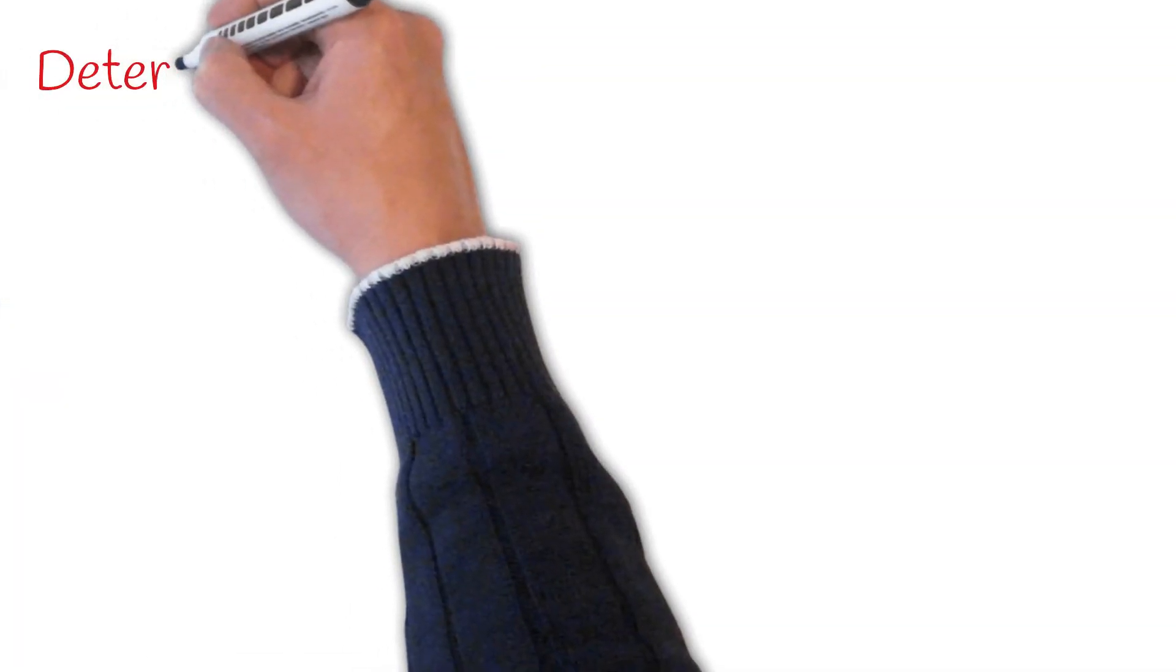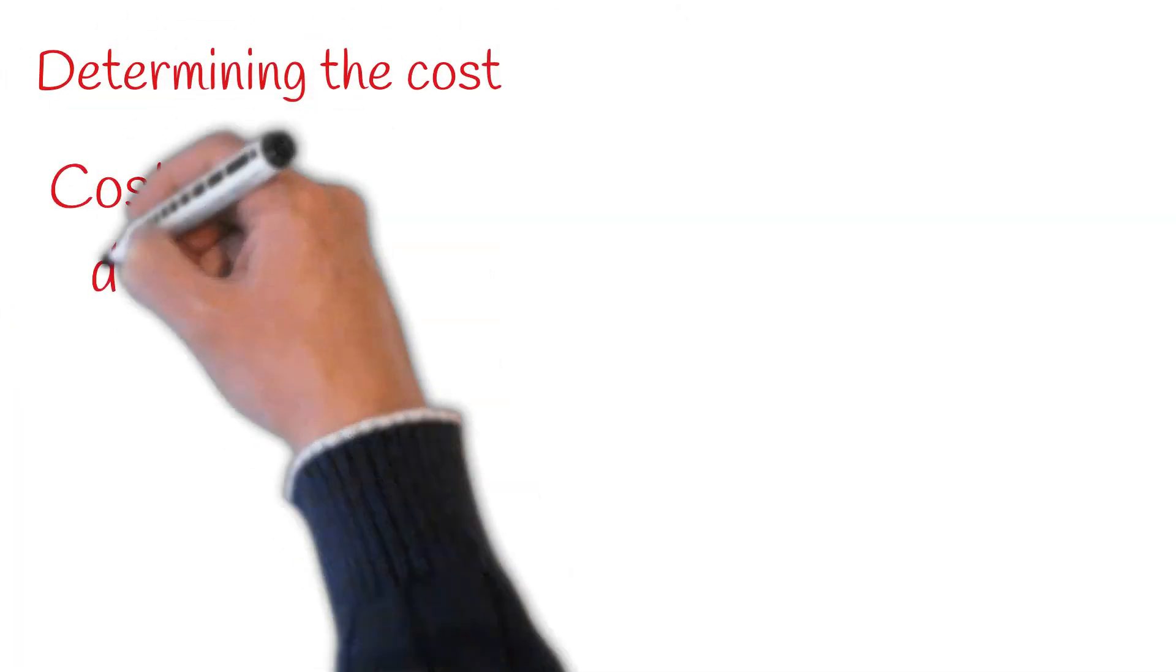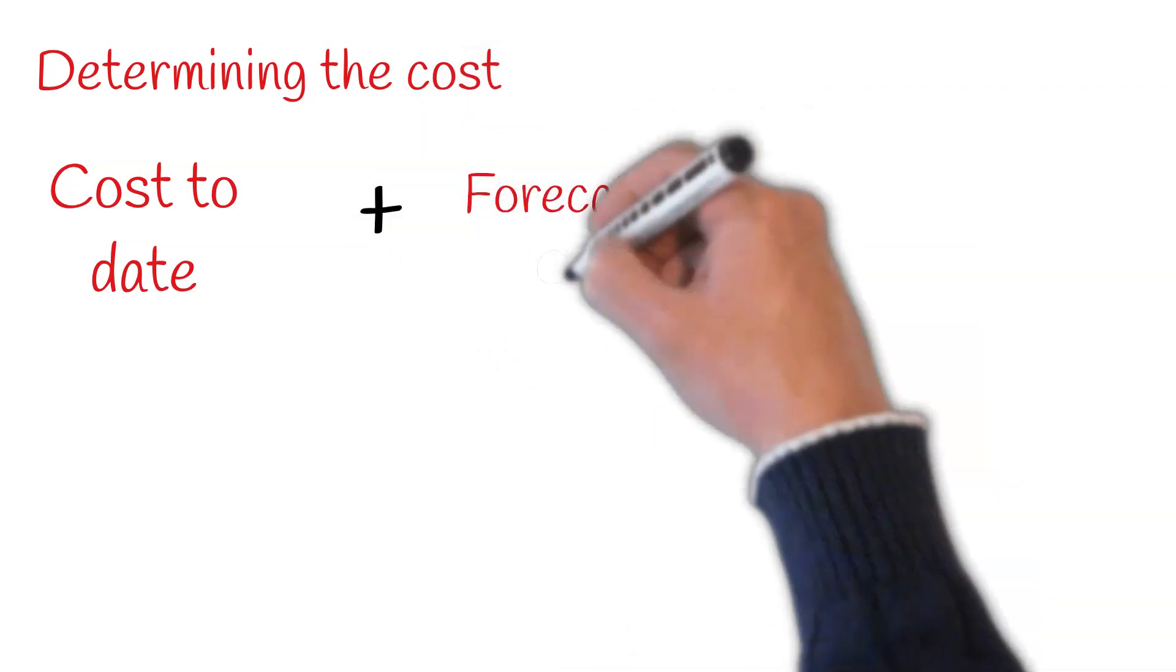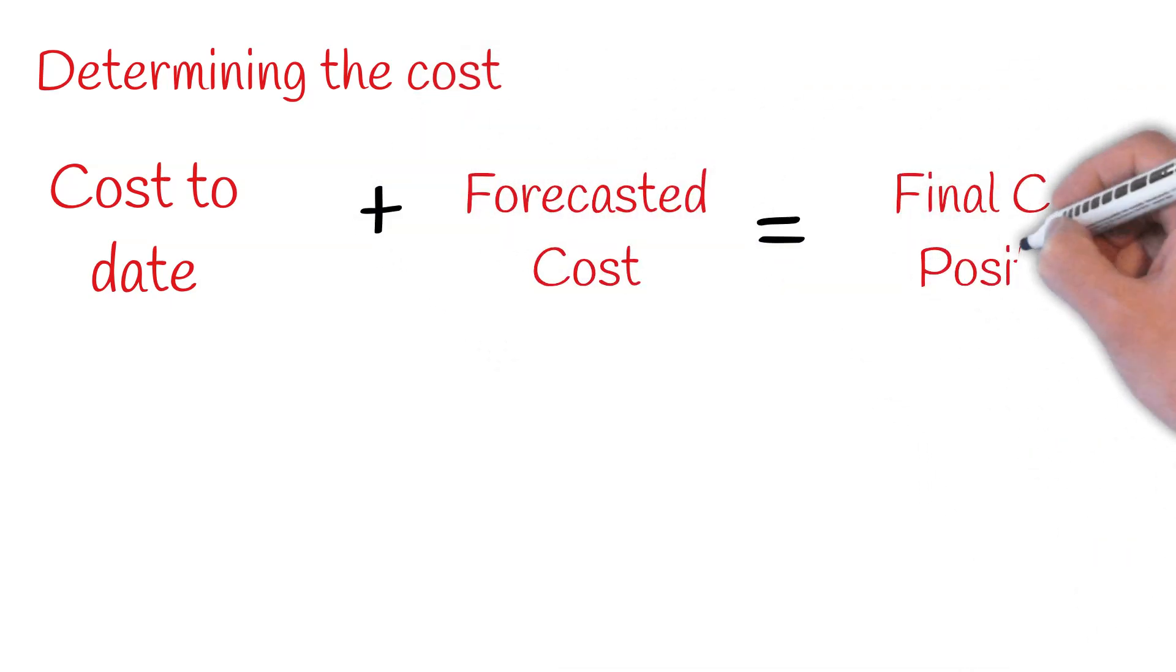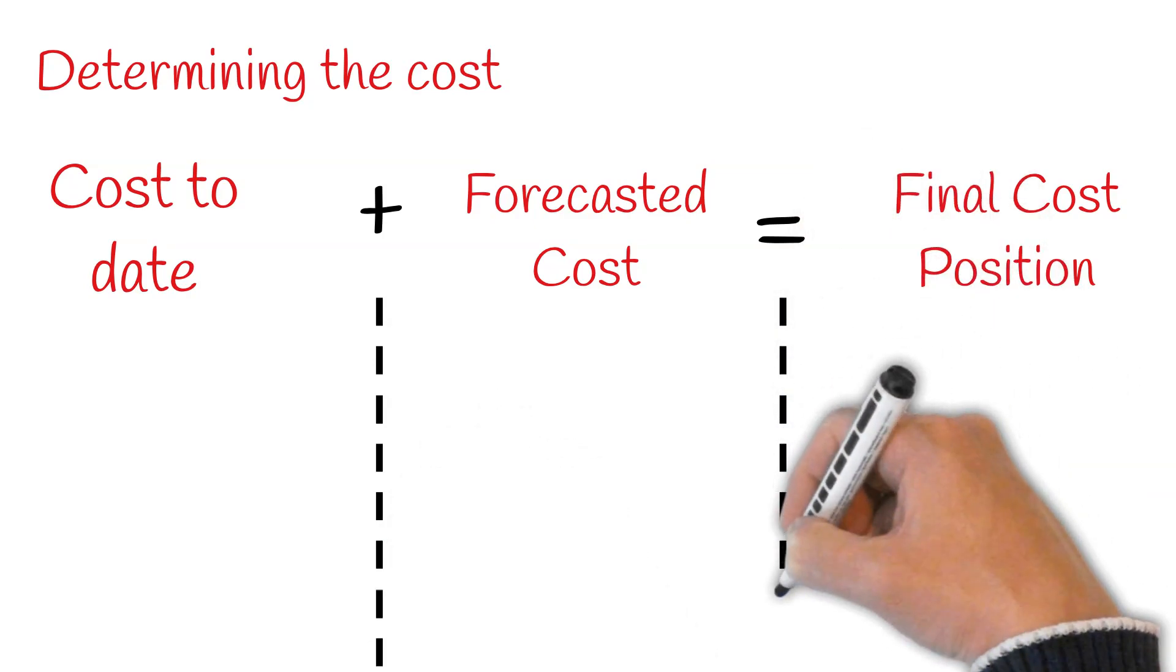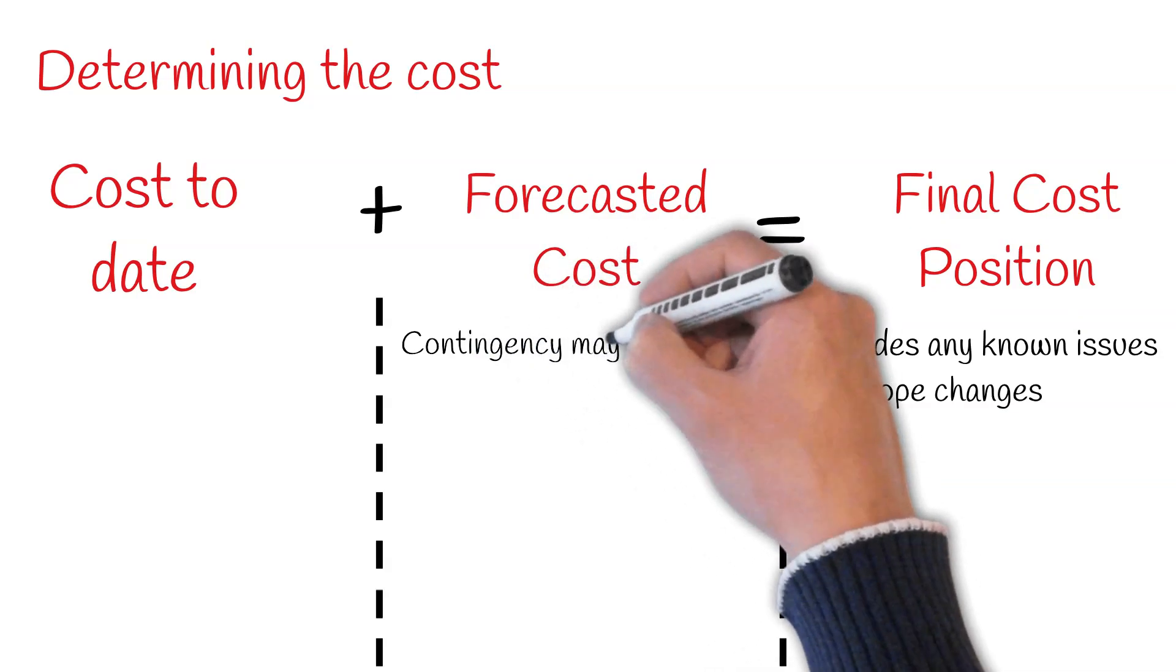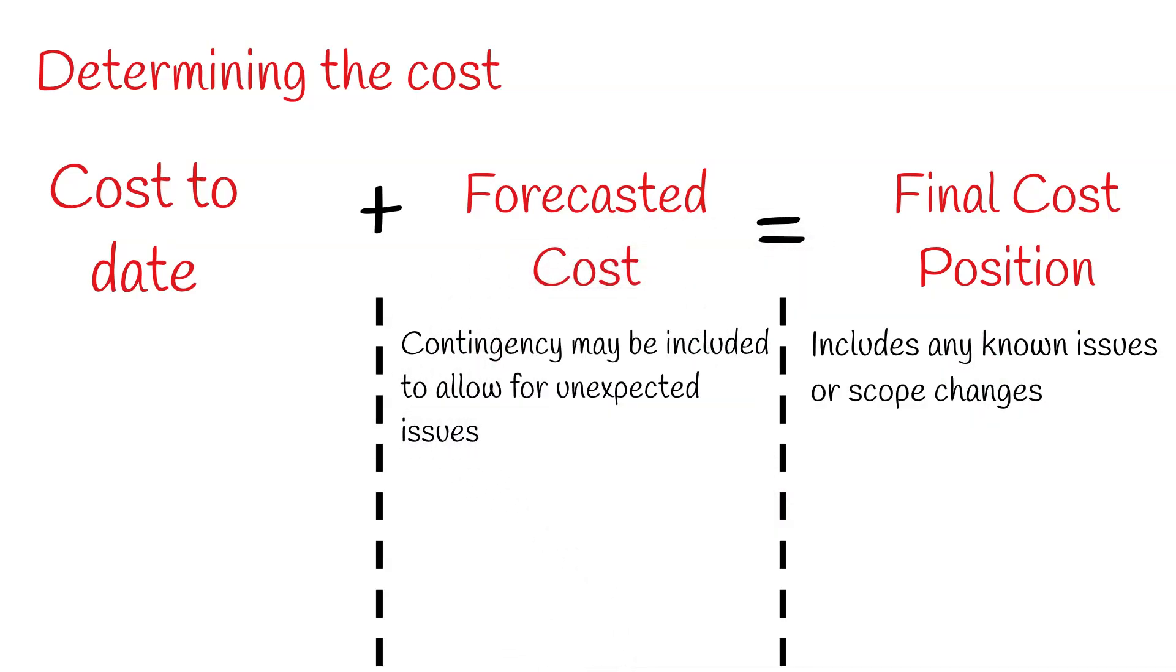Determining the cost of a project will require not only an understanding of the cost to date, but also what the final cost position for the project will be. This will need to take into consideration any known issues or scope changes. It is also likely that a contingency will be included within the cost to allow for any unexpected problems which may arise.